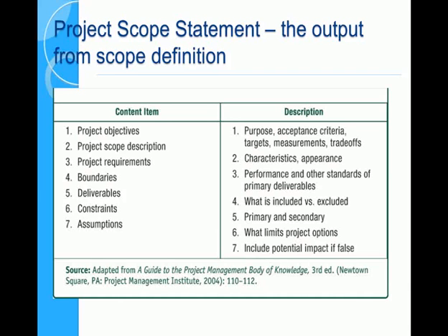The other thing is that the project management plan is based on the assumption that all approvals would be achieved. I'm not going to go through that here, we're doing short lectures, but typically project management plans for larger projects with environmental impact, they can create the plan, but there's no guarantee that that plan will be the one they can use, because it depends on the outcome of the environmental survey.